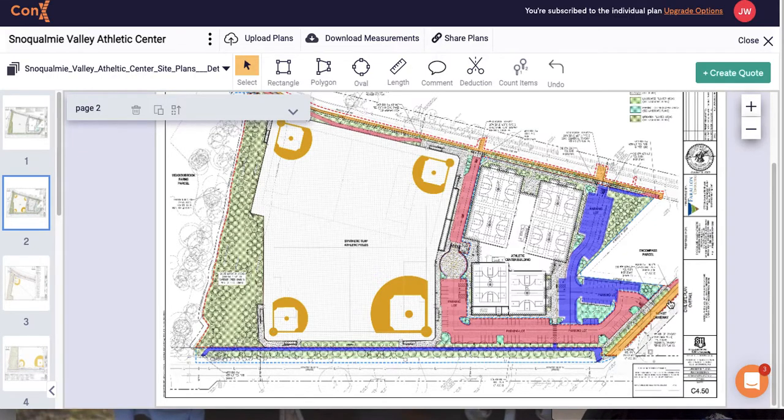This is our 6-inch depth of asphalt, 6-inch depth of asphalt up here, 6-inch depth asphalt down here. I can't remember, I might be mistaken, but I believe that 4-inch depth of asphalt is a larger rock, like a 1-inch HMA, and then the 2-inch final lift that we put on top of it is a 1/2-inch rock of HMA. So those are your location number 1 and number 2.